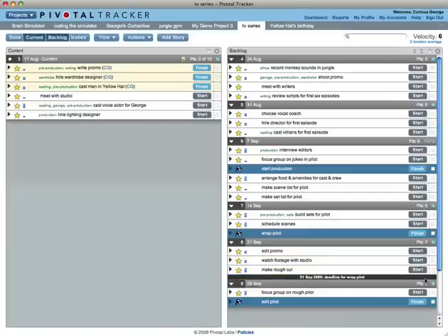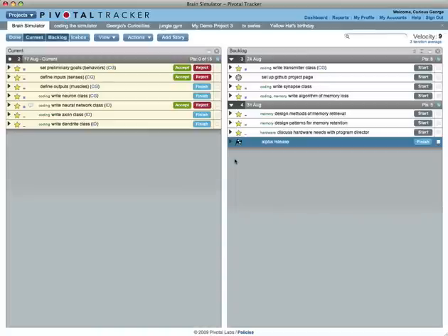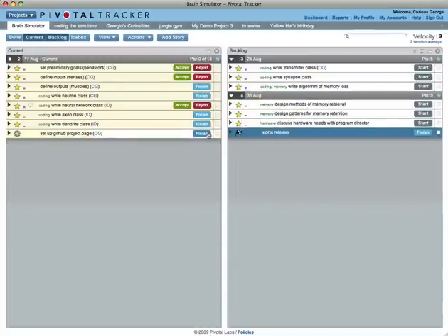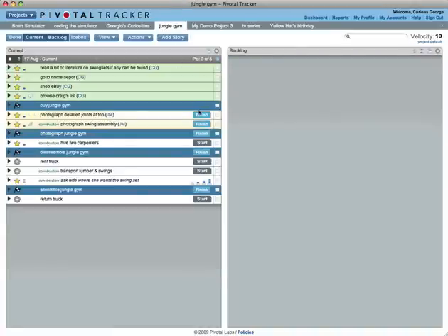Most stories are features as they provide customer visible business value. The rest are bugs or chores. Chores don't need to be delivered or accepted after they are finished, and neither chores nor bugs are worth any points, although that can be enabled. Releases are also treated as a type of story, so remember to click Finish when you release.